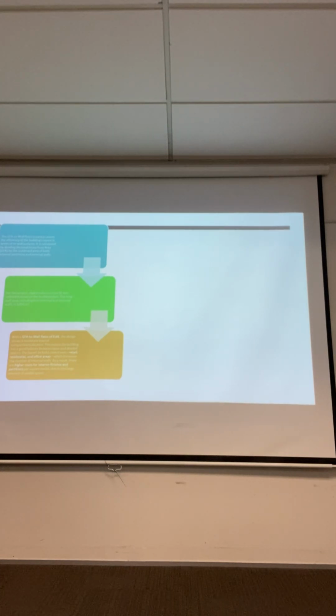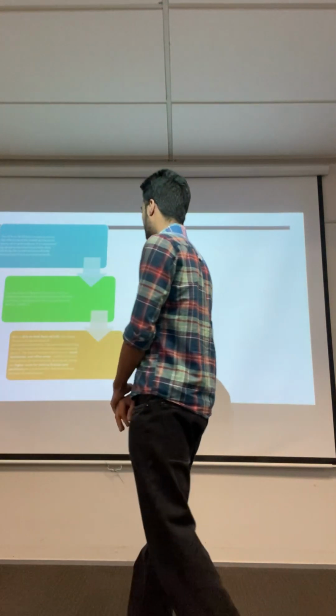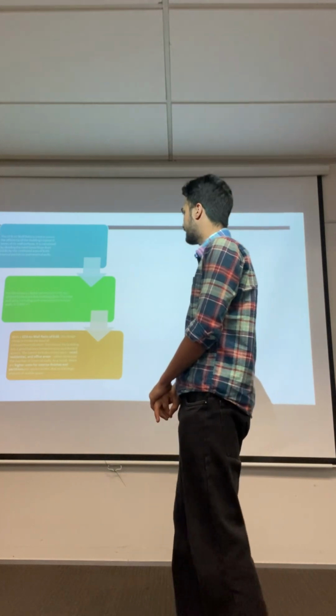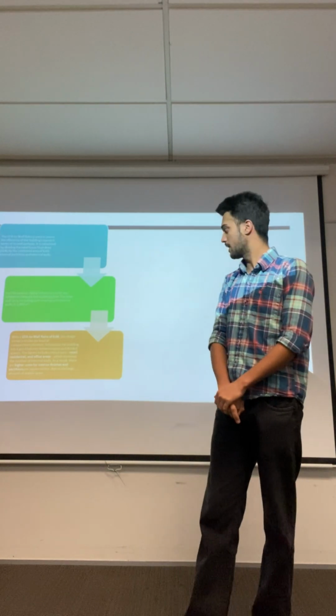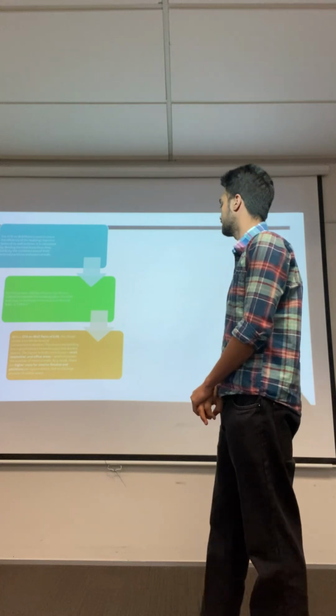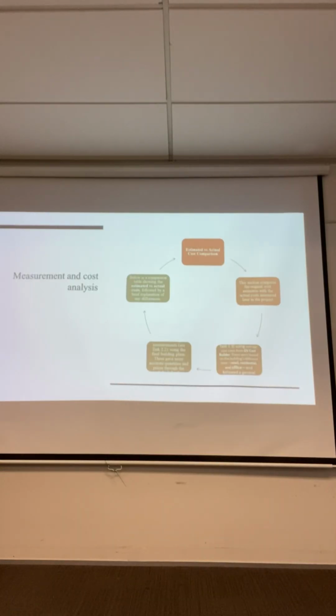For the project, digital software was utilized to measure the building plans and the total wall area, including both internal and external walls. With a GFA to wall ratio of 0.68, the design shows a moderate level of complexity. This means the building has a good balance between open space and walls.